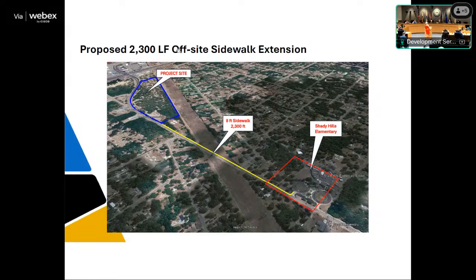So what that did was it got traffic that was sitting in the right of way, in the traffic lanes for Shady Hills, over onto a queuing lane, so that traffic no longer queues on the travel lane. So that's been an improvement, and it was done in about 4 months between when we were requested to do that, it was constructed, maybe 5 months between agreements and actual construction.